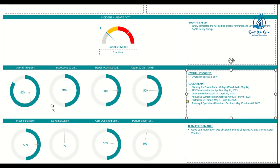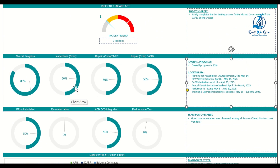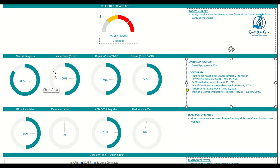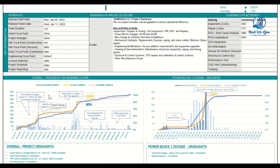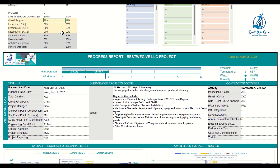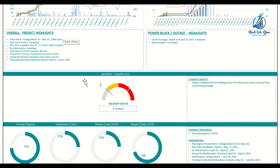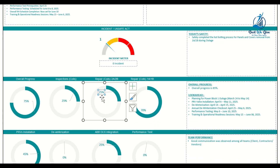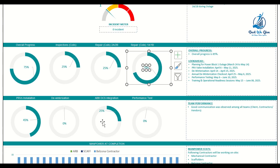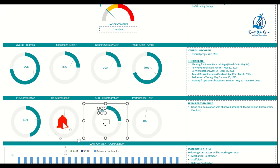Next is the milestones section, which shows all key milestones. For example, this project includes inspections and repairs on one section, repairs on a second section, installations, electrical work, testing, commissioning, and startup — these come from the WBS of your schedule. You can easily update them at the top: if overall progress is 75%, type 75; if inspection is 25%, repairs 25%, and so on. Once you change the percentages, all the donut charts update automatically.